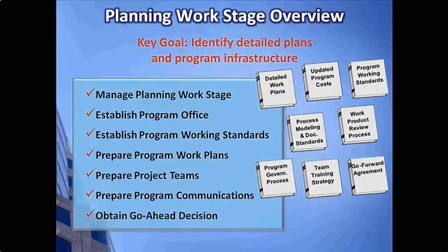We need to prepare program work plans. So these are plans that identify the tasks, steps, milestones, and work products that come out of your efforts. We need to prepare the project teams, assemble the teams together, make sure the resources are available. If there's any pre-training that needs to happen, for example, you may find that you want to certify your project team members in ITIL Foundation as a starting point. That kind of an effort would start as well.